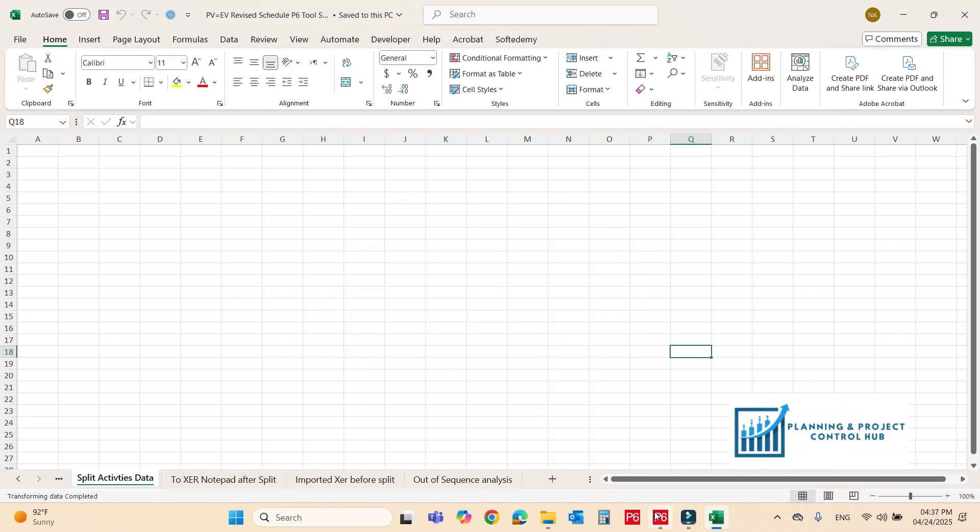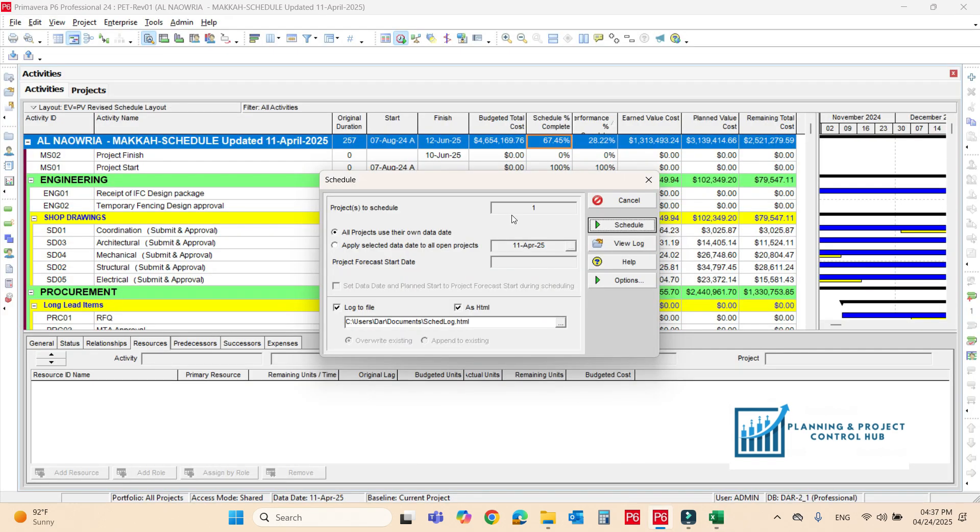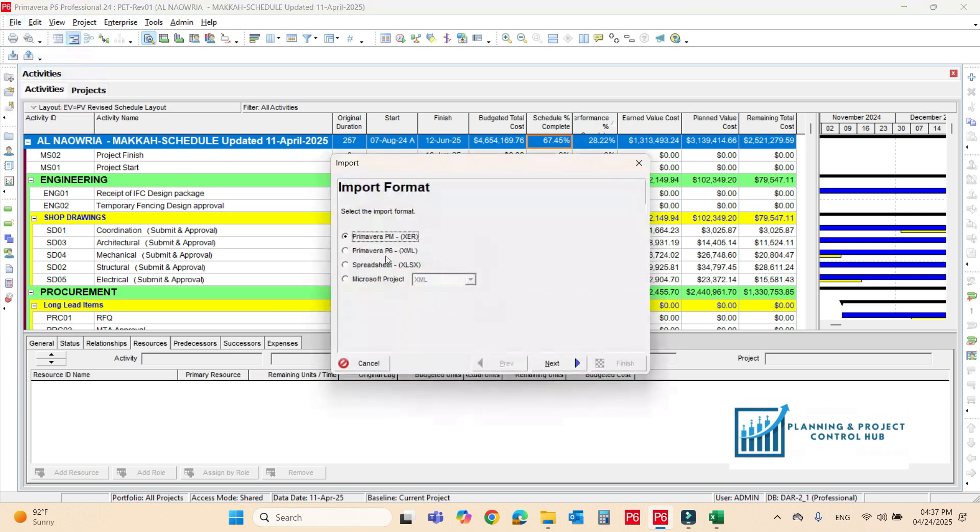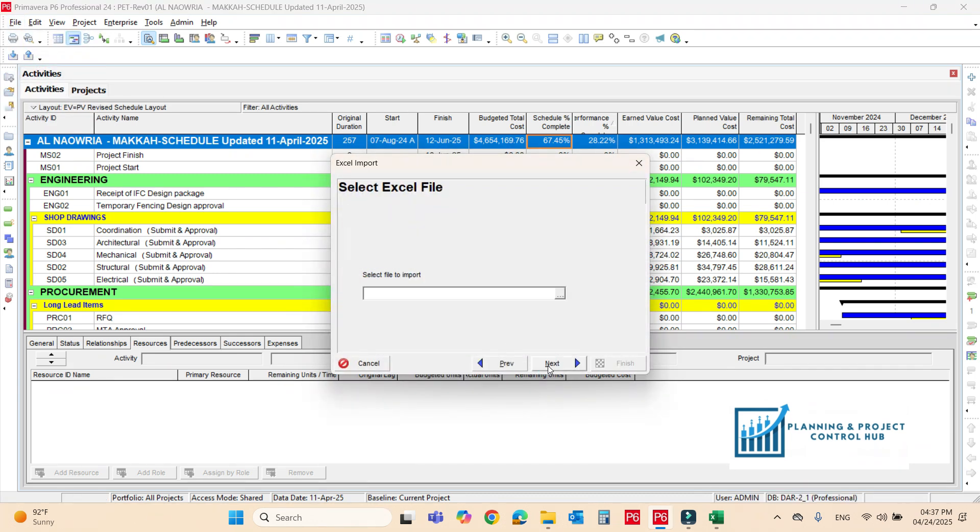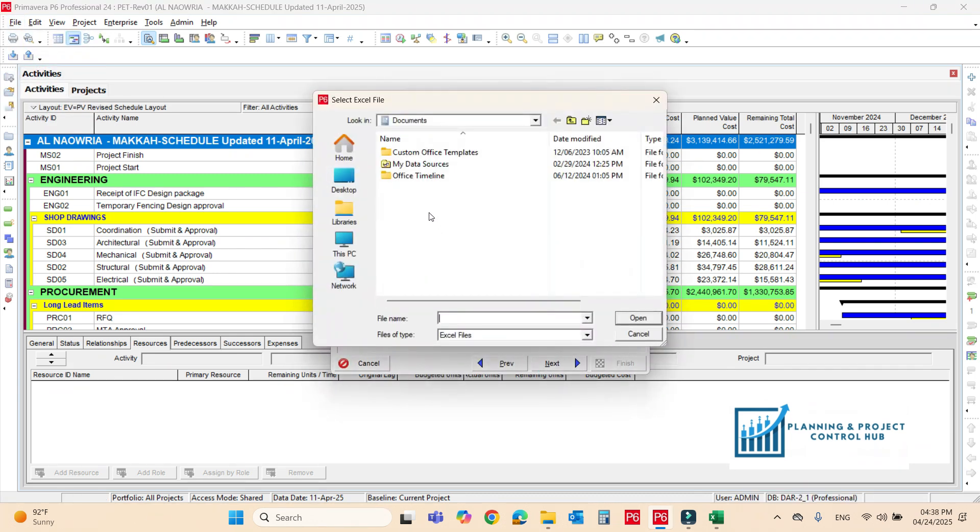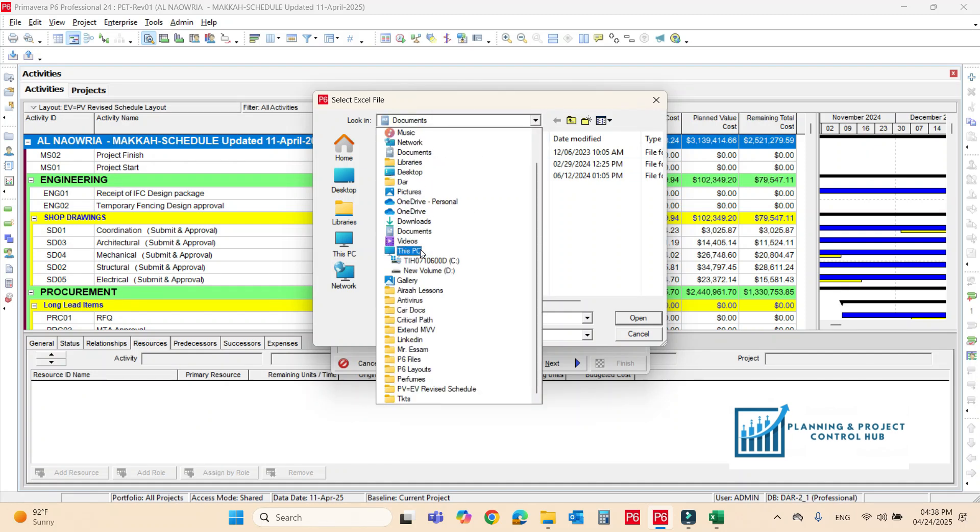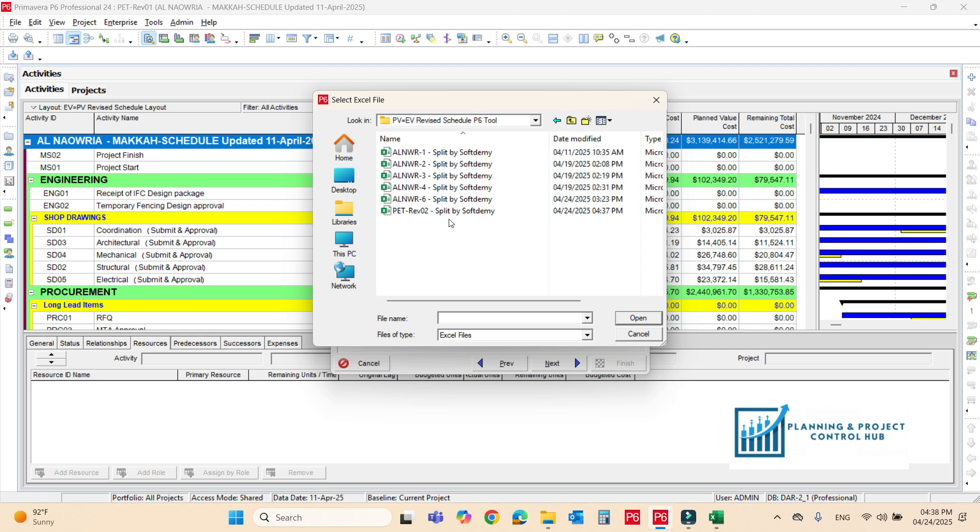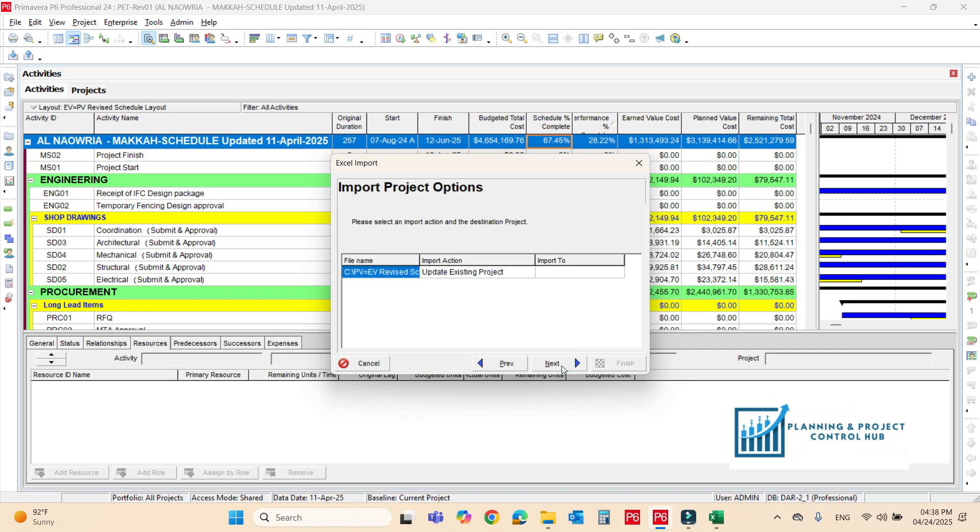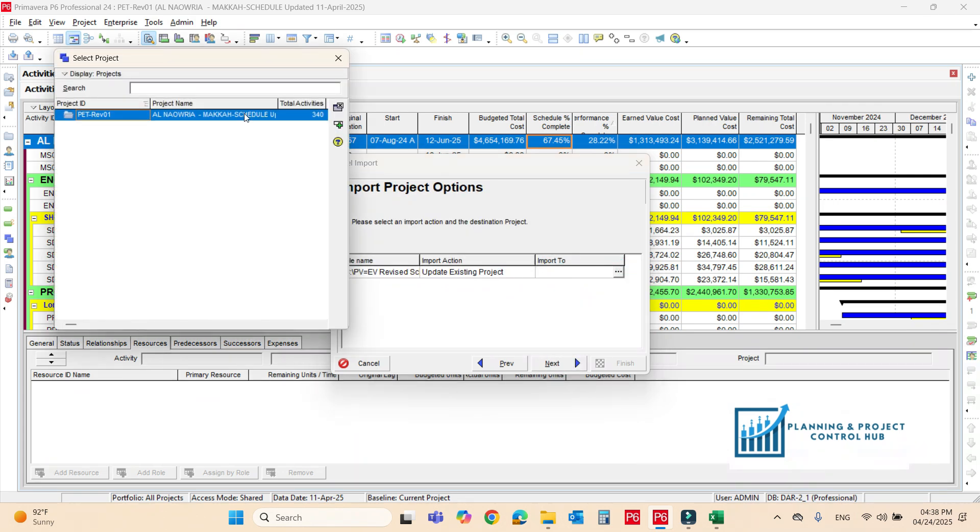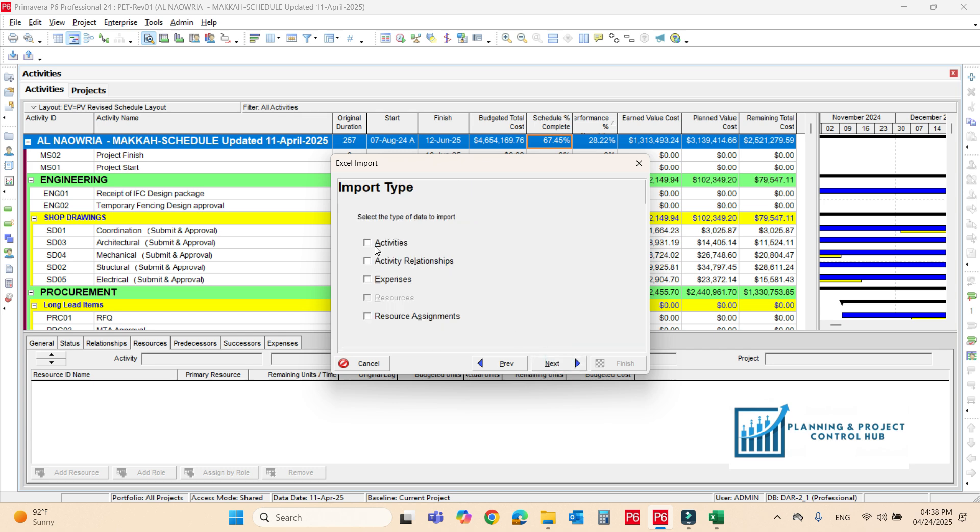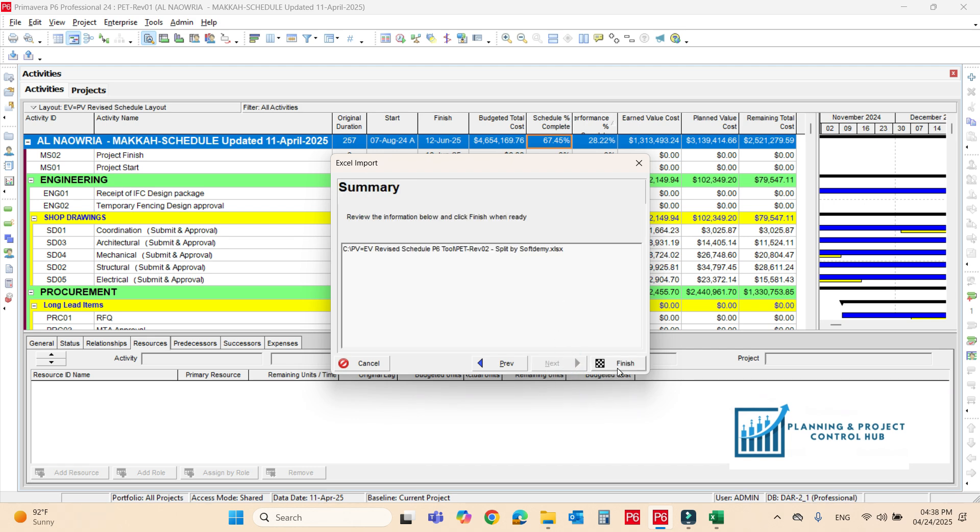Now, you will import the file. Just go to import P6, import files. We have to import the excel. Make sure where is the file, it will be in the C folder. We have now this file. We can import this file. Next. Import the schedule next. Make sure to check all these activities, activity relationship, expenses, resources. Next and finish.